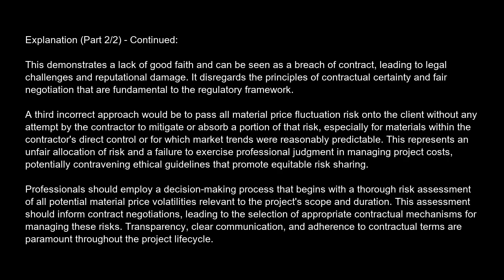A third incorrect approach would be to pass all material price fluctuation risk onto the client, without any attempt by the contractor to mitigate or absorb a portion of that risk, especially for materials within the contractor's direct control or for which market trends were reasonably predictable. This represents an unfair allocation of risk and a failure to exercise professional judgment in managing project costs, potentially contravening ethical guidelines that promote equitable risk sharing.